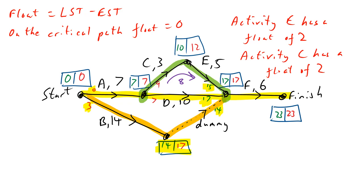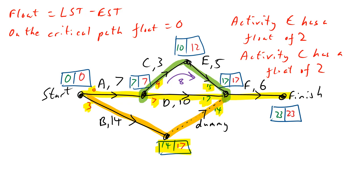That's what we mean by float — some of these side loops can be delayed without affecting the whole critical path. Though technically you should be drawing a second box here to catch that float issue with activity C, which the books don't explain properly at all. If you think more about the loops and look at the differences in the numbers, you can see the float more clearly.